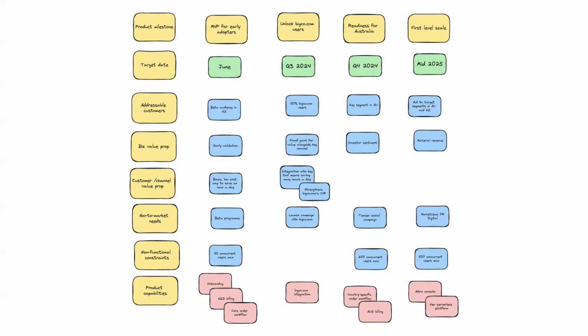Once that set of milestones was reasonably clear, that's when I started looking at what the actual effect on the addressable market is, what the actual value proposition is, and so on. What already existed was the product capability. There was already a big bunch of epics just sitting there, in your usual Kanban board style. And then it was just a matter of lining up those epics with each of the milestones. And this is something that we do weekly.